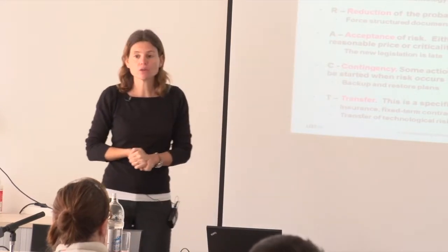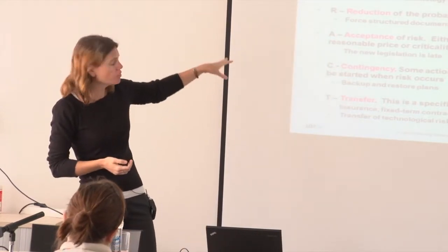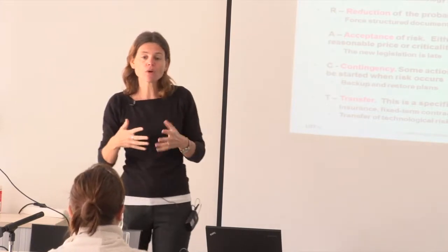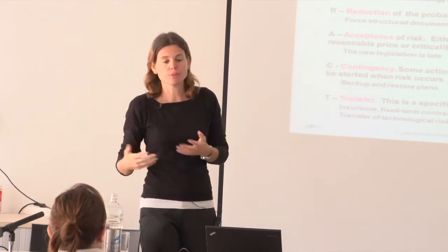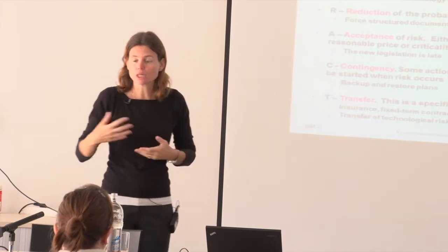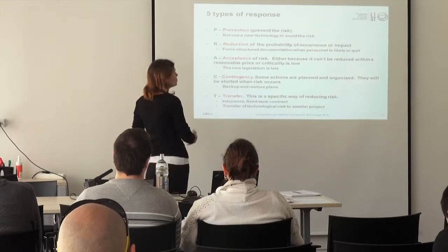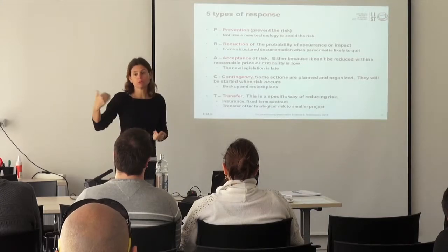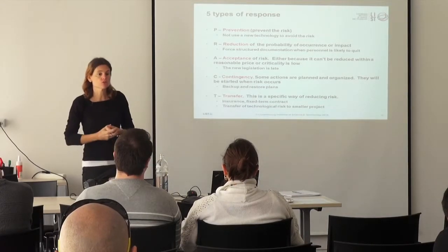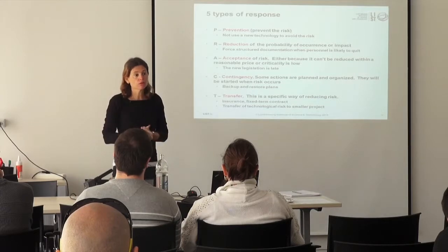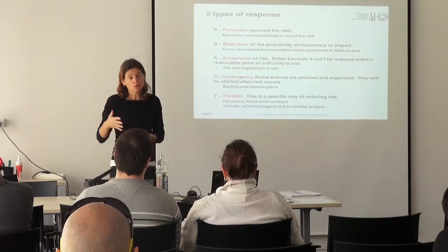Other actions you can do. So you see, with these first actions, it's more oriented to preventive actions, so trying to reduce the risk. Then you have some contingency actions, so post-risk occurrence actions. So the risk has been identified, it's there, it's happening. What can you do?